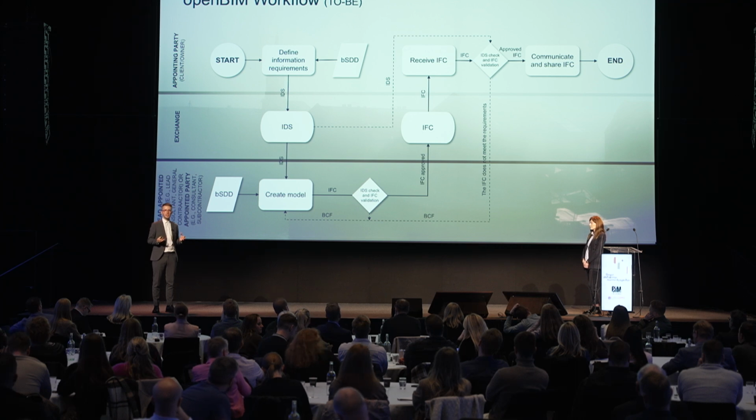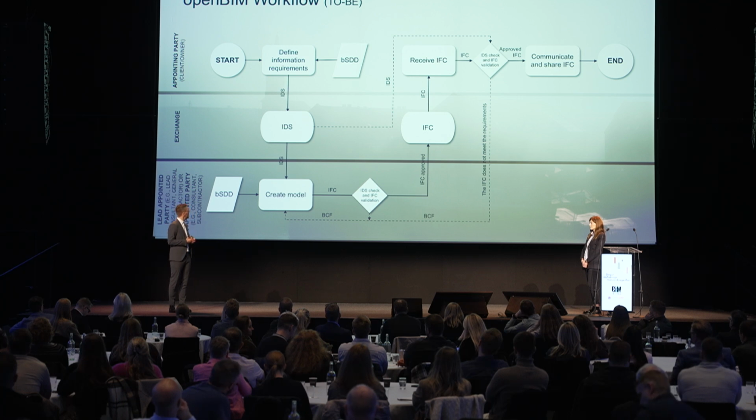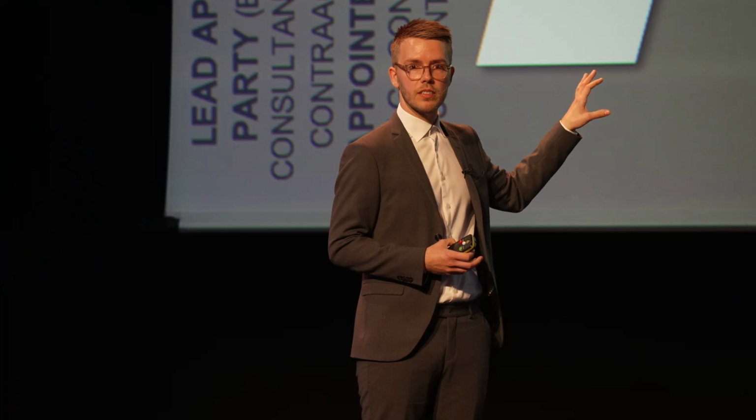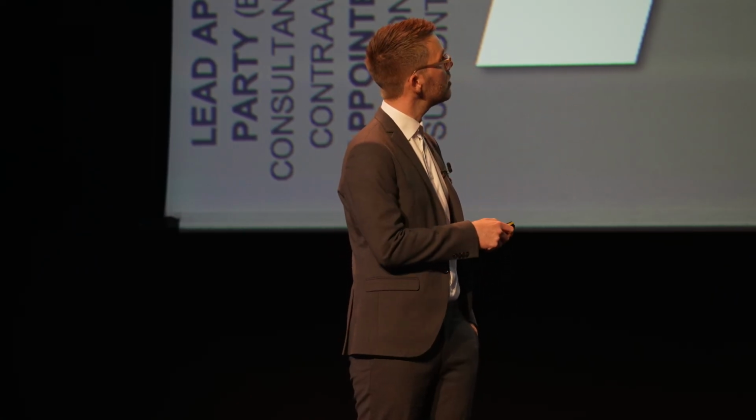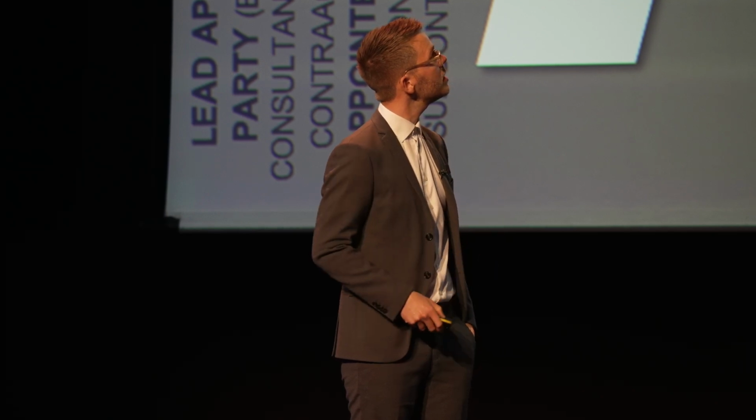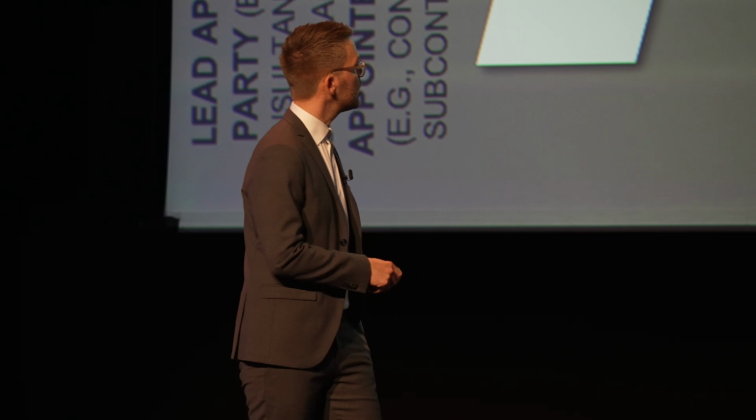This is necessary because we are relying on a correct IFC model to test it. Then they do an IDS test based on the IFC model. Then they can send the IFC file to Fehmarn. Fehmarn can do the same check or just demand documentation of the test which has already been done.